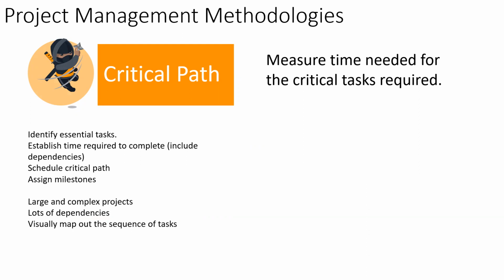So laying the walls is dependent on the completion of laying the foundation. Okay, so it's important to understand those dependencies because that shows you where your project is at risk of being delayed and what tasks have to be done on time.